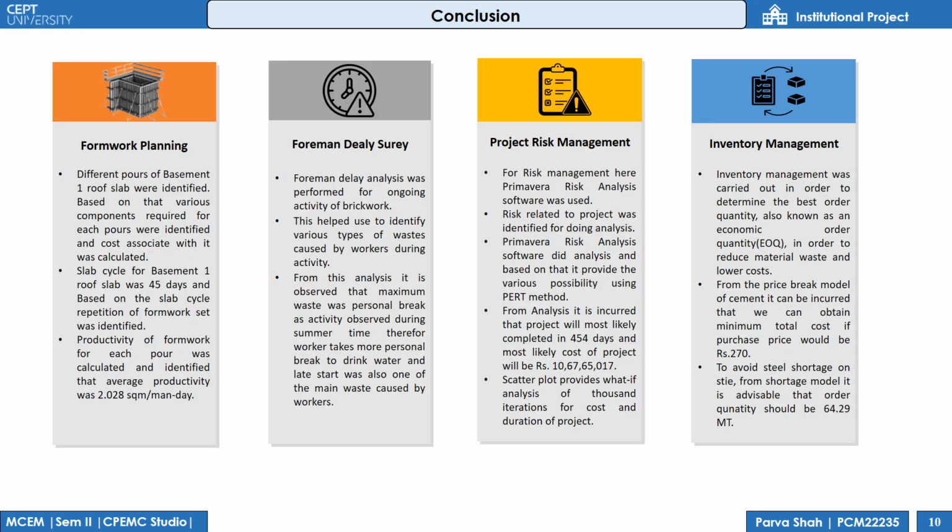This is some conclusion of our studio activity. Formwork planning. From formwork planning, we get the requirement of various components required for formwork, also slab cycle of each floor, and we get to know the productivity of formwork.